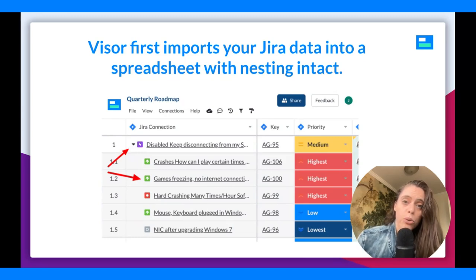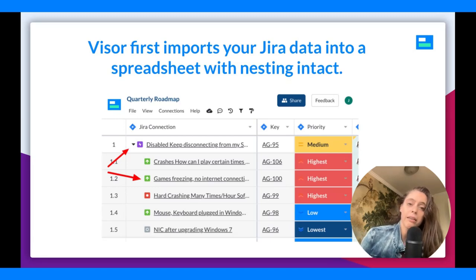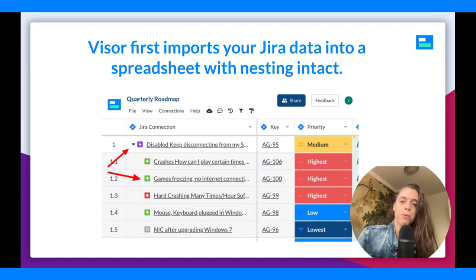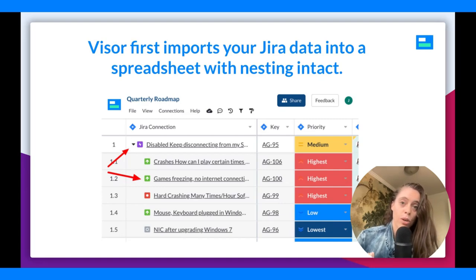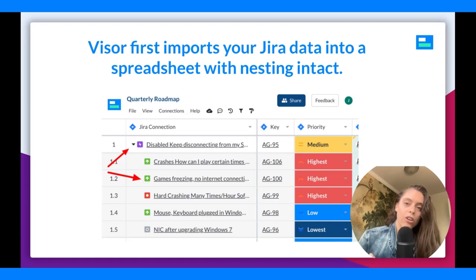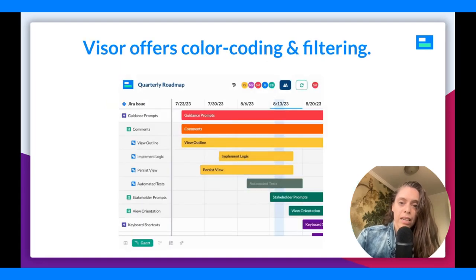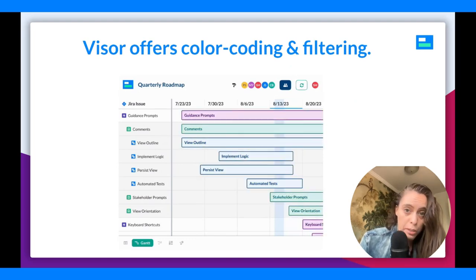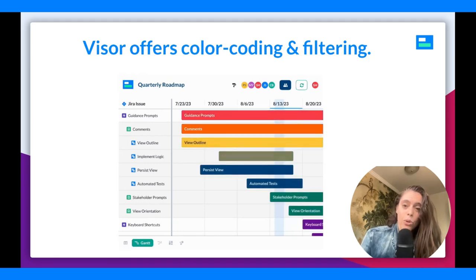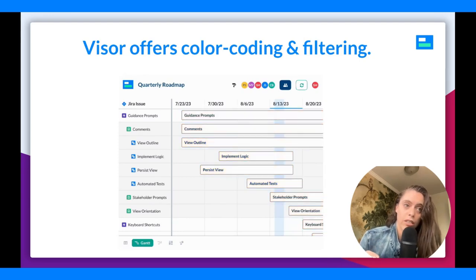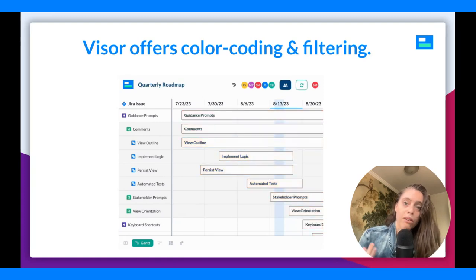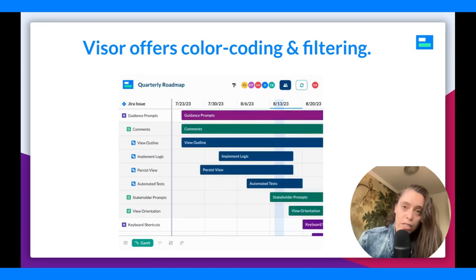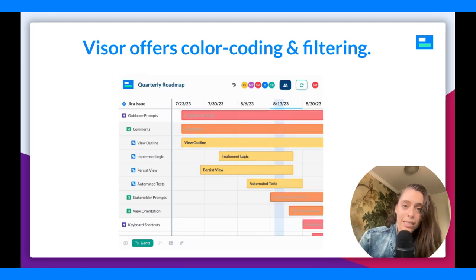When you first import your Jira data into Visor, it will go into a spreadsheet — that's the backbone of our product — with the nesting intact that you already set up in Jira. We also import the dropdown selections and a lot of details you put time into when structuring your data in Jira; we honor all of that. You'll then be able to transform it into a roadmap, color-code it, and filter it to your liking. The filtering is critical: you can choose what nesting level to show, filter to just show epics, or filter based on assignee or whatever criteria you see fit.